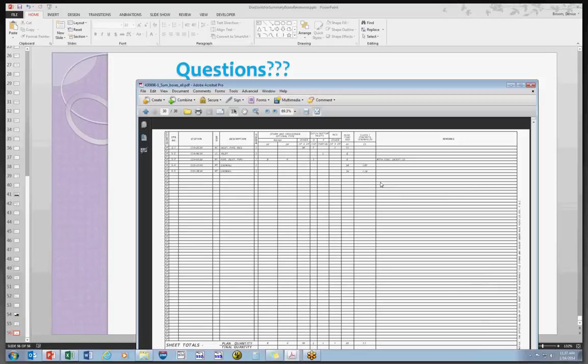I'm not going to say you have to put this in the summary of miscellaneous drainage. If they want to see and include this, okay, the structure numbers, and because they have a few in here and they've assigned structure numbers to them, and it's showing the number of barrels, if they want this information, then it needs to be in the summary of drainage structure sheets.